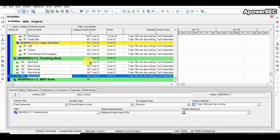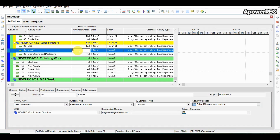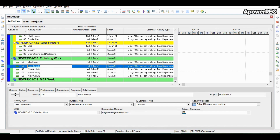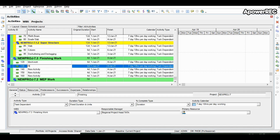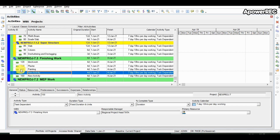Now adding activities in finishing work, but first let us change the durations for superstructure. Slab will take 12 days minimum, column will take 6 days to complete, and deshuttering and destaging will take minimum 3 days. Now adding activities in the finishing WBS: first is block work which has been added, then plaster is renamed as the second activity. The next activity after plaster is painting. Although at site after plaster the MEP work happens and then painting, within this work package we are putting painting after plaster — though it is not mandatory.